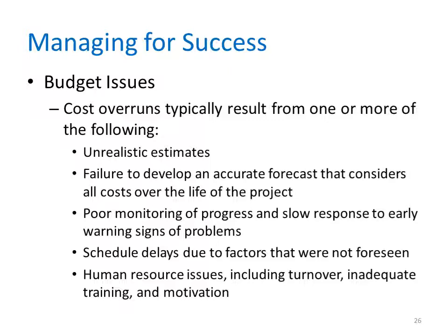Estimates can be based, again, on prior knowledge, on previous projects, similar projects, any number of things, but your estimates, both time and monetary, have to be realistic. And remember, anytime you add time to a project, you're also adding money. Anytime you try to shorten a project by adding resources, you're also going to add money. So that's where that project creep concept becomes critical also.